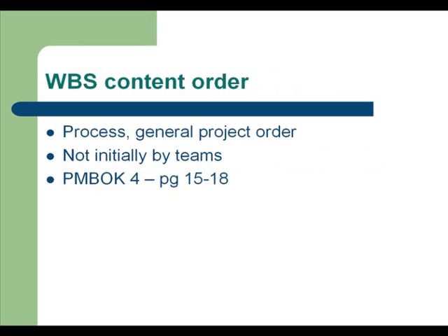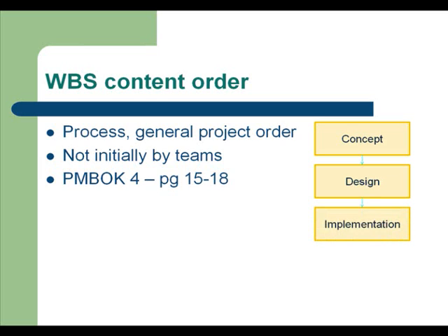Generally, it makes sense for the work breakdown structure to follow the order of the project from start to finish. The general project life cycle is the concept, followed by the design, the implementation, and the finalization. These will be covered in far more detail in further presentations. However, when you start to develop your work breakdown structure, it will make it a far easier work breakdown structure to follow and manage throughout the life cycle of the project if you include the tasks in this order.